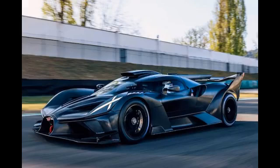External sourcing, potential benefits: guaranteed 20% horsepower increase by partnering with a reputable engine builder specializing in drag racing applications similar to LJRC's car. This would achieve the targeted output of 5,400 horsepower. Faster completion timeframe, estimated 4 weeks by an experienced engine builder. This aligns better with LJRC's racing season schedule. Reduced risk of engine damage due to the vendor's expertise in building high-performance drag racing engines.